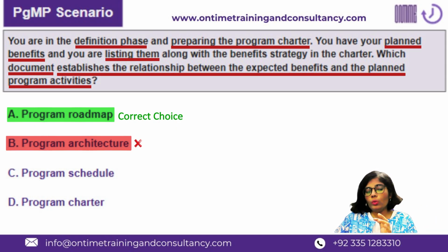So this is the sequential order of program artifacts, but roadmap has no defined order. So those who feel that roadmap is created after the charter is created, they are wrong. Roadmap is not a baseline. It has no dependence on any artifact. You can have roadmap even during the business case as well.